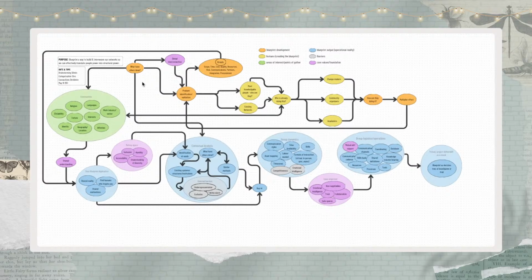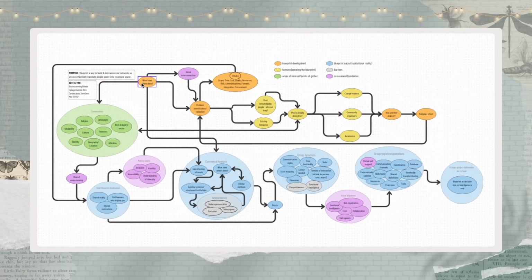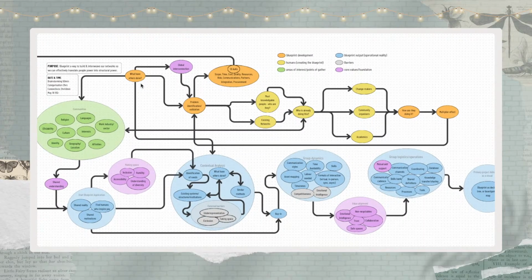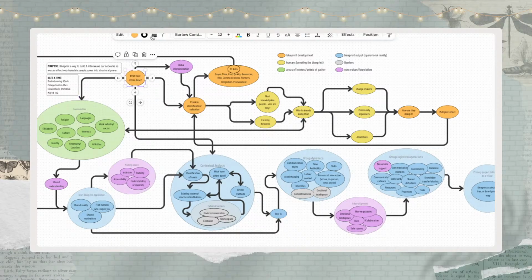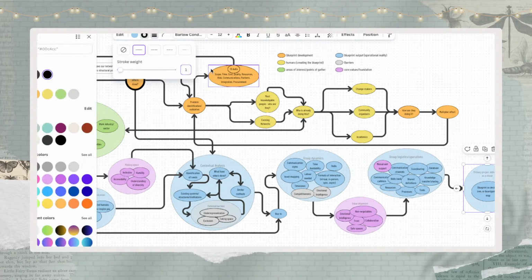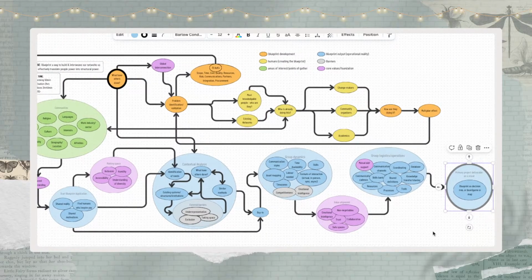One of the important things that Ali has mentioned is start and end. When we see something that doesn't have an arrow coming in or coming out, it's because it's the start or the end. If we find that something is not connected, there's a gap, unless you have a subproduct somewhere else, which could happen, right? If you have this in phases, an output that doesn't connect to anything later is fine, but it has to be a conscious output or a conscious input.